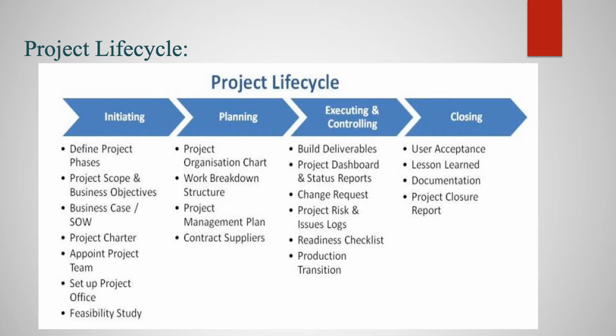executing and controlling. So you have to build the deliverable, what you are going to deliver. Okay, so the project dashboard and status report, and then project risk and issue logs. We have to write down what issues we are going to face, like an issue log, we have to monitor and write it down. And then the final phase, like user acceptance, the documentation and all. You have to prepare the project closure report. At the end of the project, you have to prepare the project close.